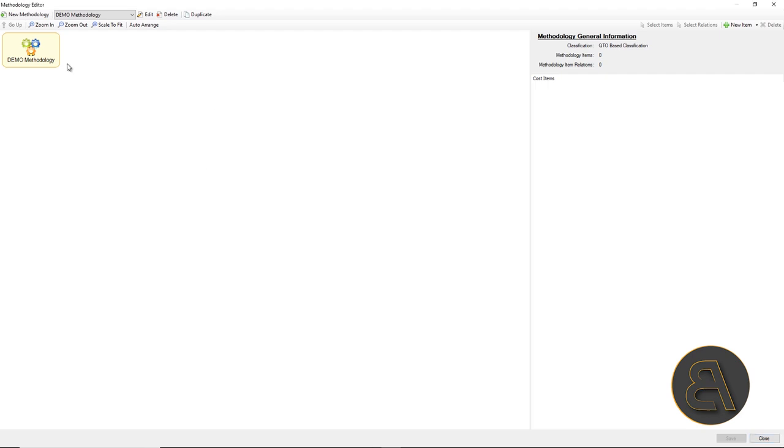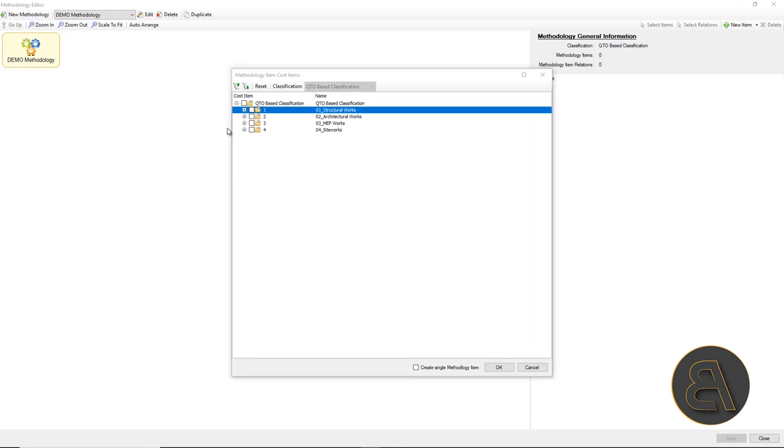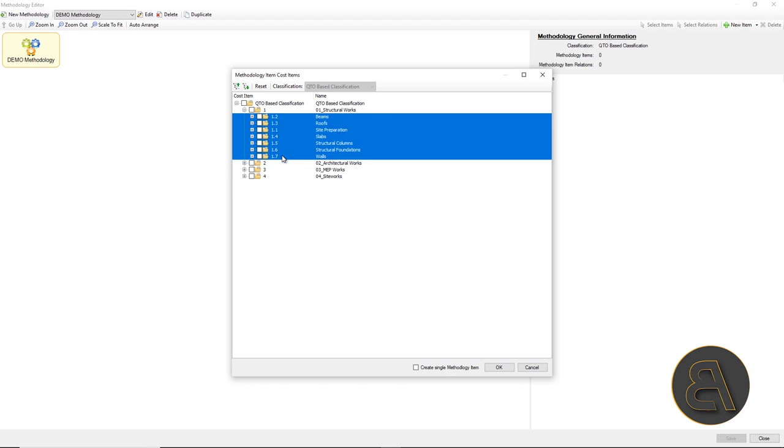Therefore, it is necessary to connect the positions from the cost structure at the level of category, which are in fact the types of works on a building into logical relations.